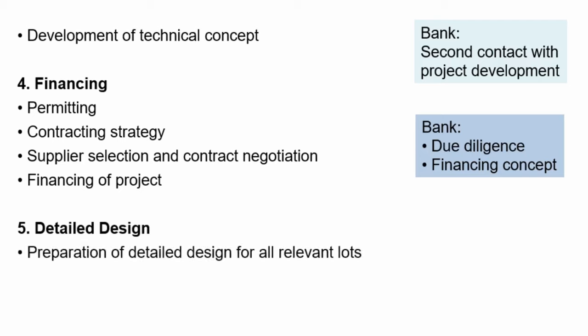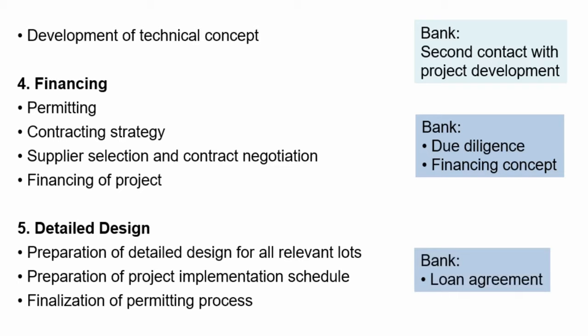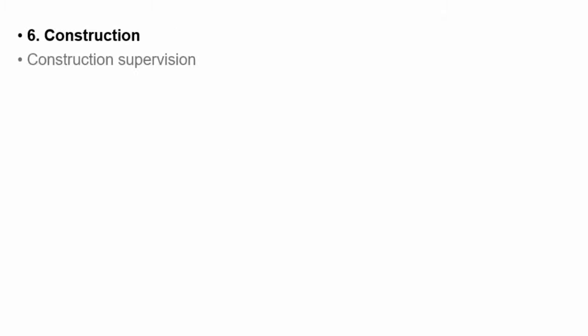Then you do a really detailed implementation schedule — how many workers you need on site, how long it will take, whether it's done in summer or winter and so on. You have to take care of all the details. You finalize the permitting process and the timeline: when will the project be online, when will payments for the purchased electricity start? And then with the bank, you come to a loan agreement with fixed interest rates.